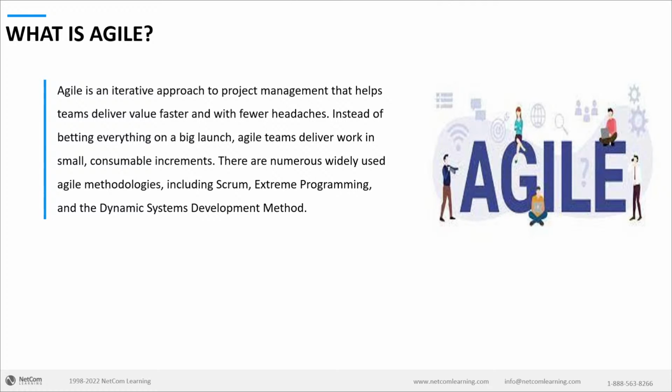How exactly is agile different? When we say a traditional approach of project management, a traditional approach simply says that you prepare a plan, a detailed plan, and you implement the project. And at the very end, there will be a review. What Agile recommends is you break this entire structure into small chunks or small iterations or small sprints. Different approaches may use different terms, but the concept remains the same. You don't prepare a detailed plan. You prepare a plan for precisely an iteration.